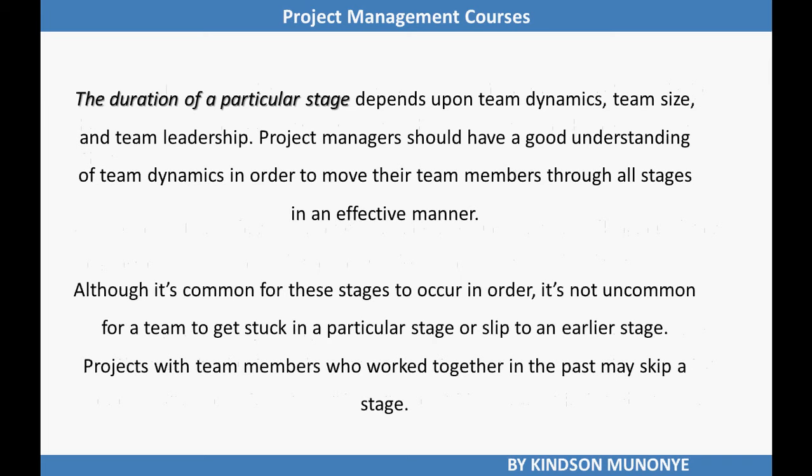Now there are some things you need to know about the stages of the Tuckman model. The duration of a particular stage depends upon the team dynamics, team size, and team leadership. So there is no particular laid down duration for each of those stages. Project managers should have a good understanding of team dynamics in order to move their team members through all stages in an effective manner. Although it is common for the stages to occur in order, it is not uncommon for a team to get stuck in a particular stage or slip to an earlier stage.